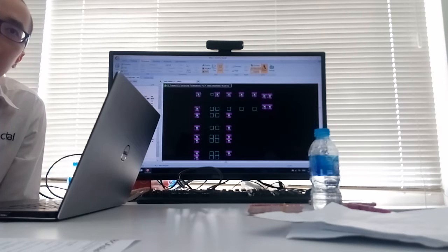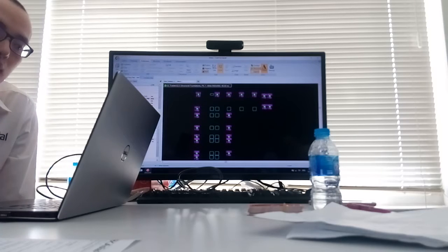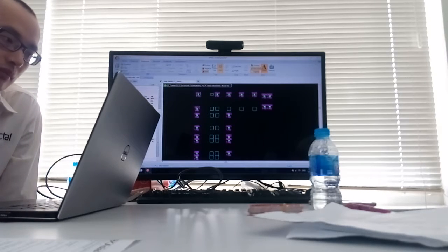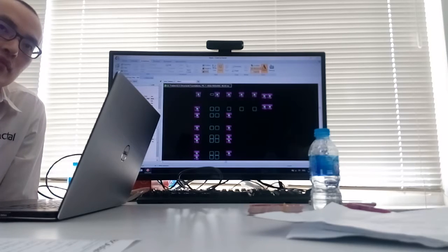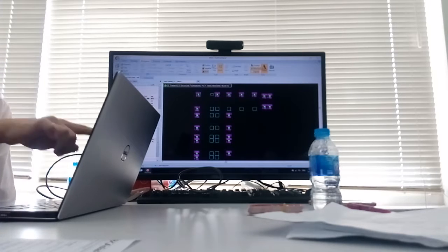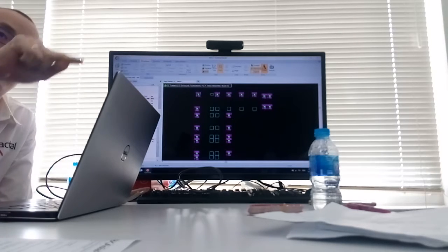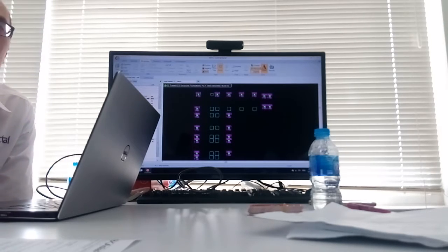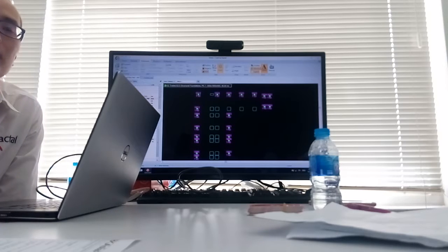Say you've got all the floor plan drawings, and they all show D1 to D50 or whatever it is. Then on the door schedule you can highlight D1, which is a double timber door, and search through the drawings to pick up how many. You can search using the label with this same AutoCount function, you highlight the label. Yeah, because that's probably more important than by design, I think.